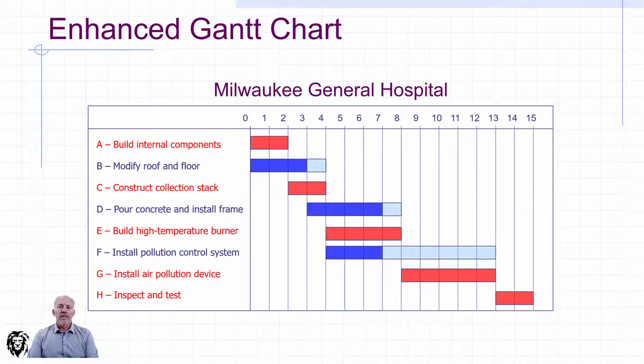So one of the weaknesses that we identified in the Gantt chart was that it didn't show predecessors. And so this has limitations as far as understanding the impact of shifting things around when you're just looking at the Gantt chart and not looking at the network diagram. But as you would expect, there's no reason graphically that the computers can't show predecessors on a Gantt chart. It just wasn't done in the initial form. And so most would show those predecessors. And so I'll just draw them in here, coming off the end of these activities, showing which activities are connected to it and doing that logically in the software, of course.